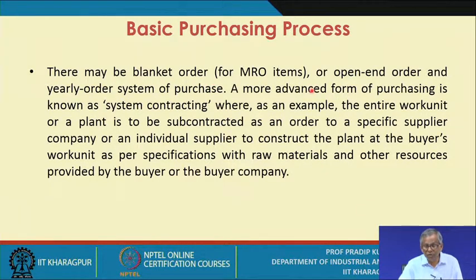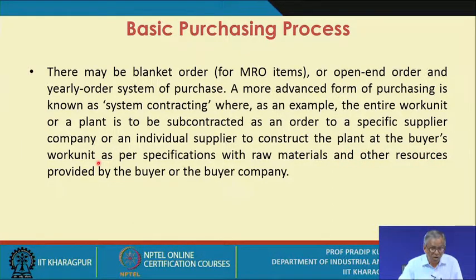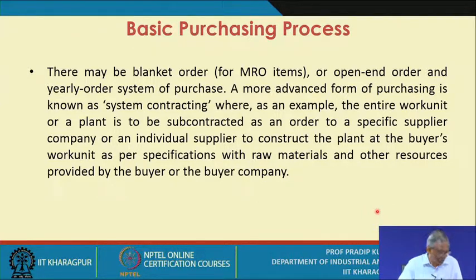There may be a blanket order for MRO items, an open-end order, or a yearly order system of purchase. A more advanced form of purchasing is known as systems subcontracting, where the entire work unit or plant is subcontracted as an order to a specific supplier company or individual supplier to construct the plant at the buyer's work unit, as per specifications with raw materials and other resources provided by the buyer. This is a special type of purchase known as systems contracting or systems subcontracting.